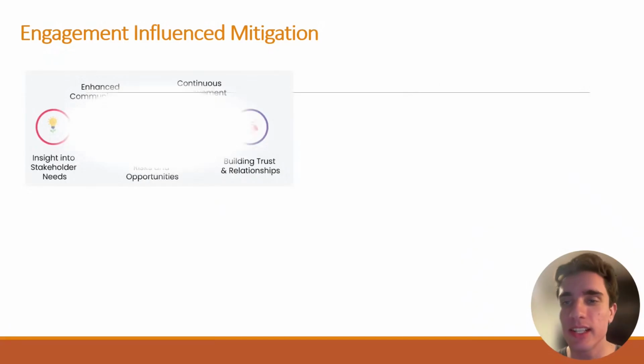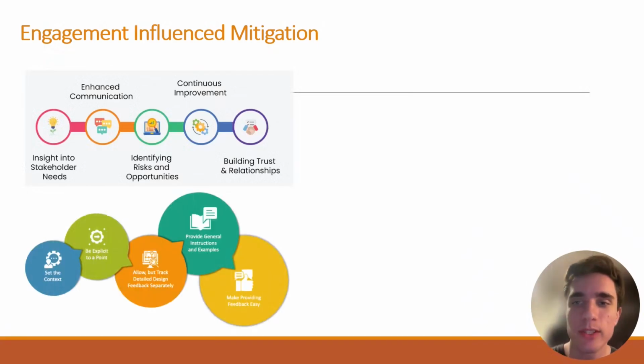A second success was that stakeholder feedback appears to have influenced mitigation and monitoring measures, particularly around aircraft noise. The flight path process is a good example. The preliminary flight paths were authorised in June 2025 after community consultation, and CASA approved the airspace change proposal in November 2025, with implementation planned for July 2026. The Minister also stated that preliminary flight paths had gone through more than 50 consultation sessions and received over 84,000 submissions to the draft EIS.